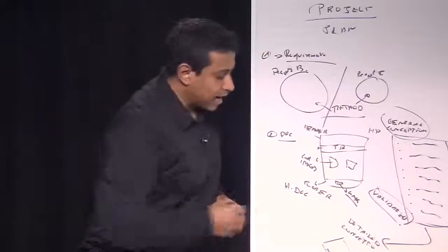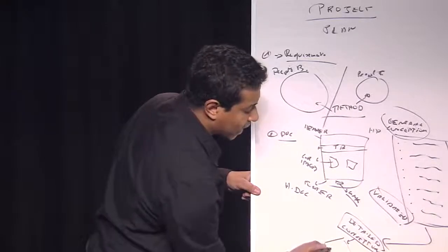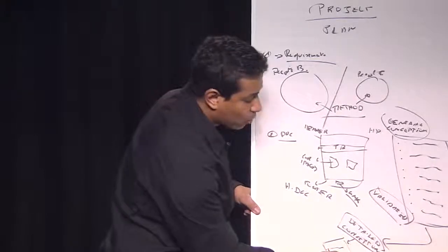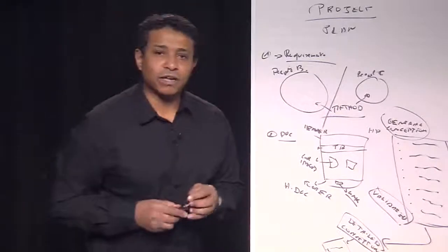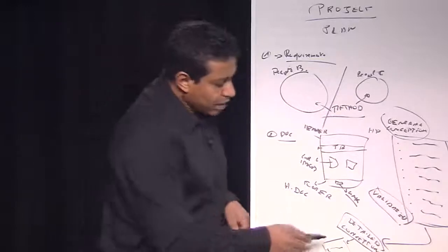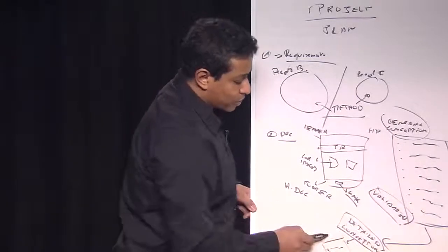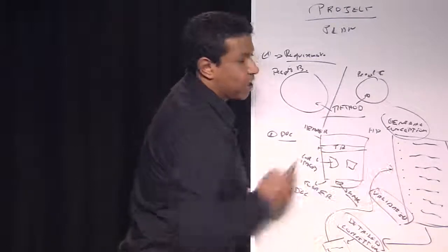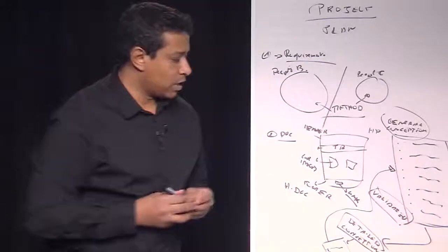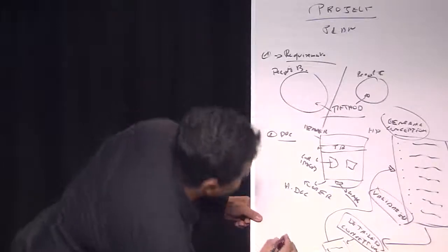It's going to mean that in my detailed conception, I will have to explain how I'm going to do it, what the use case is, and how I'm going to work on it, which is not really a faster way to do so. Plus, if in the detailed conception I understand that something is wrong in the general conception, it means that we have to go back to the general conception, saying something isn't possible, it doesn't match. Right after this back and forth has been done, we're going to begin the development.